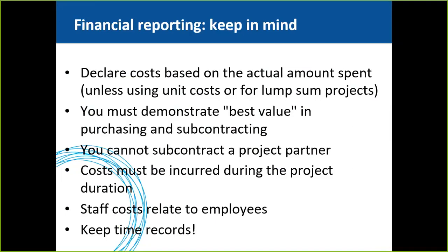It's important to keep in mind that staff costs relate only to staff that is actually employed by the entity, and not to any other people who might have helped or worked on the project but do not have contracts in your entity. If you have equipment costs, you must note that the equipment is charged based on depreciation costs. And although it is not a requirement, it is recommended to keep the time spent on the project on timesheets.